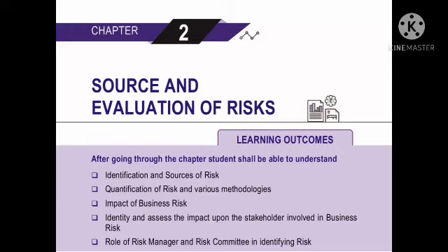To give a response to risks, i.e., aspects of addressing risks. Broadly, the risk responses are categorized into the following buckets. Risk action, description. 1. Avoid: exiting the activities giving rise to risk. Risk avoidance may involve exiting a product line, declining expansion to a new geographical market, or selling a division. 2. Reduce/manage: action is taken to reduce the risk likelihood or impact, or both.